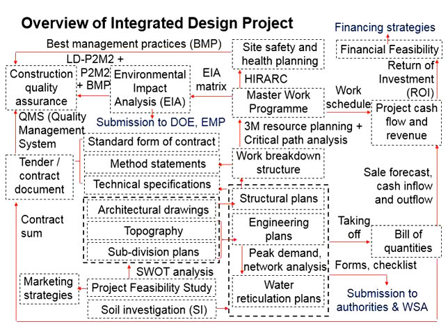Within the contract documents, the contract sum as well as the requirements in terms of the specifications of the materials, qualities and standards, as well as the project duration, are all clearly specified. This shall outline the responsibilities as well as the obligations of the contractor, as well as those of the employer to the contractor for that particular project.